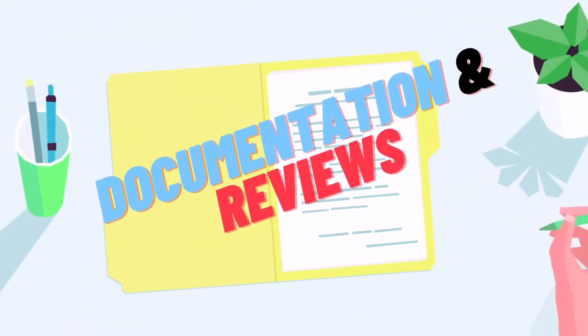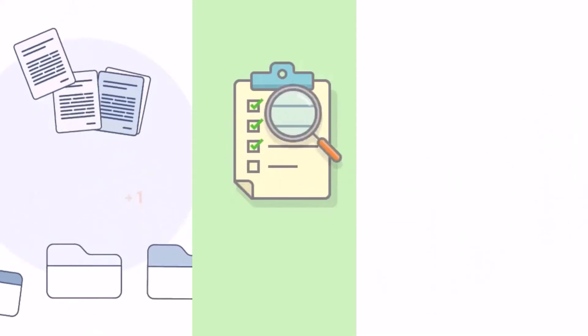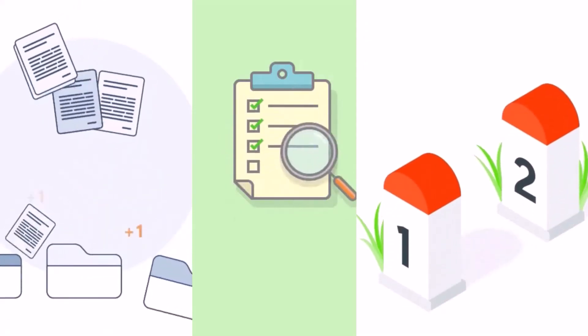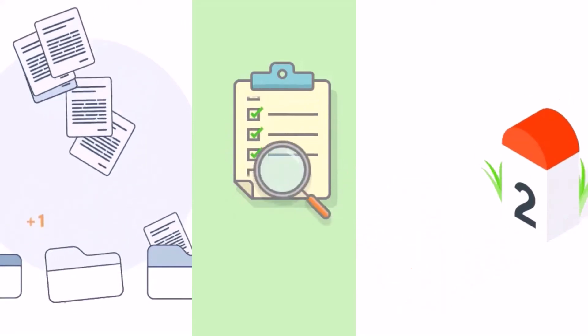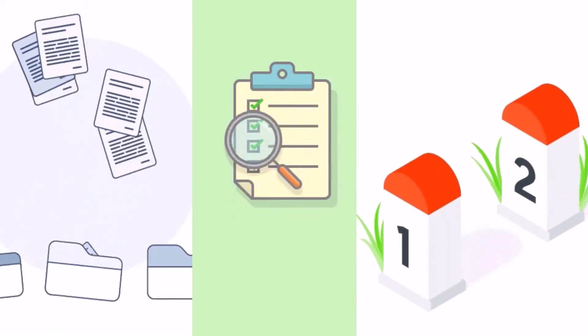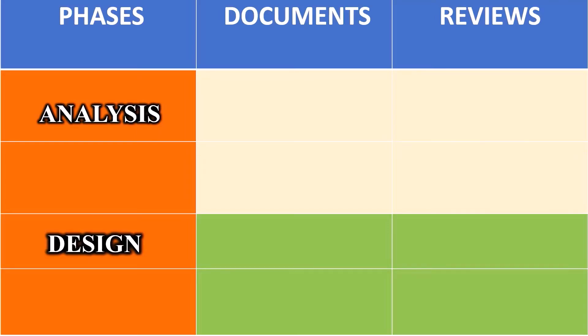Next we are going to see about documents and reviews. As the project evolves, it is difficult to identify the resources extended and to predict schedule delays. Establishing milestones, review points, and documents can improve project visibility. In each phase of development, documentation and review take place.